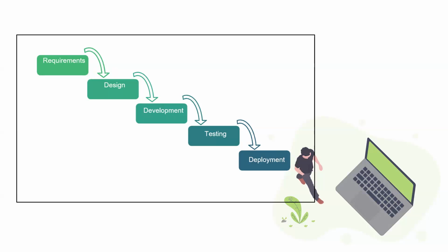That is your typical waterfall project methodology. The issue with this is, you could have gotten here and then you find out that there's an issue along the way. What that means is you now have to go back to the beginning and tweak. One of the disadvantages of waterfall is that if requirements are not done, you can't start doing design.